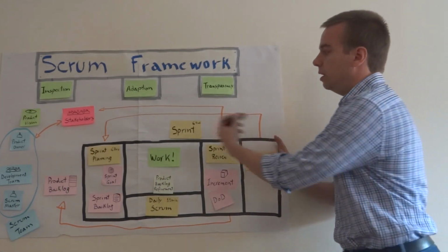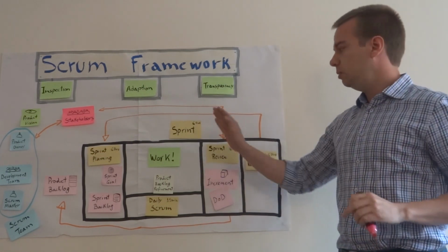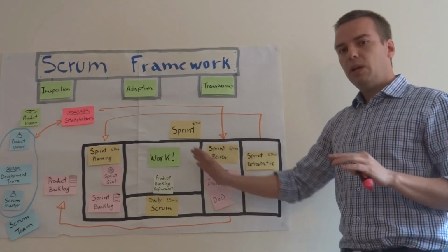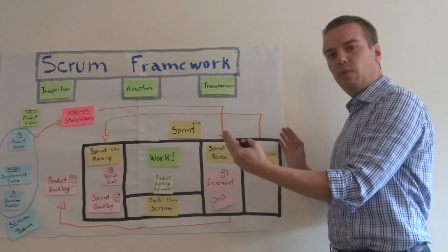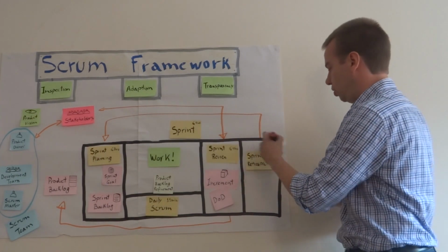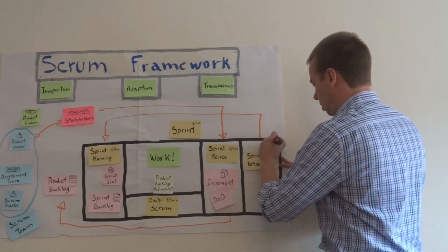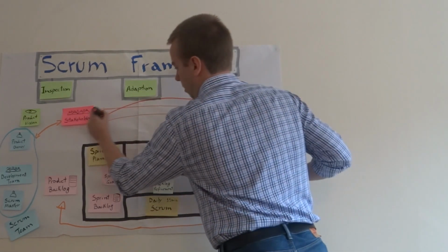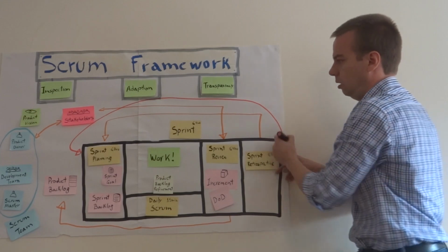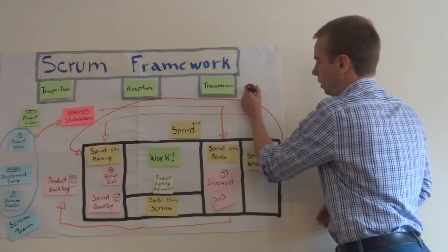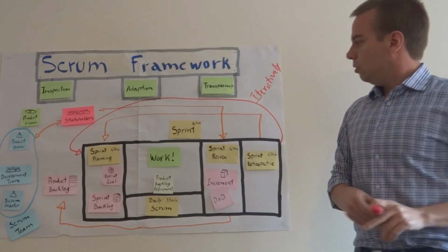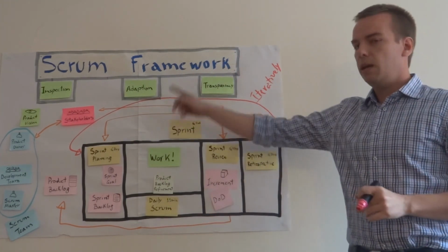This is the end of the time box of the sprint. The sprint ends when the time box expires. And regardless of what happens, this is a fixed time box. Another sprint will start as soon as the previous sprint finishes, when the time box expires. So this will happen iteratively. Whenever this time box expires, another sprint starts. And we should keep the same pace and cadence.